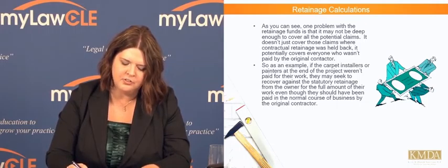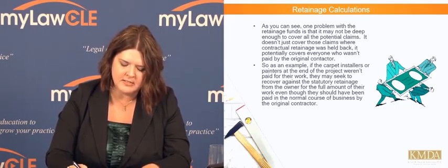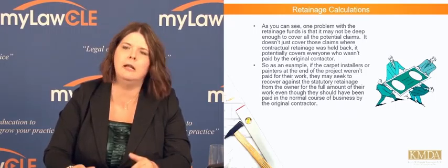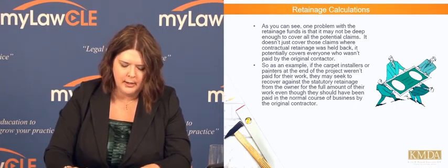From the first day that work was performed, using a pre-notice requirement, Florida does that type of system, and from the date work was first performed, using a pre-notice requirement, Texas does that type of system. So you have to know what kind of system your state uses and then work from there.